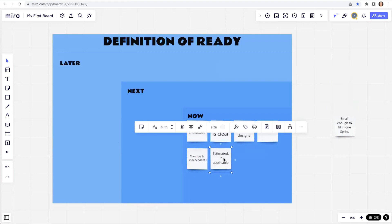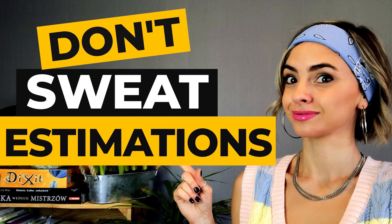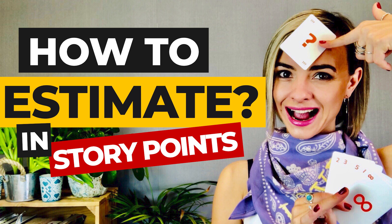Next is estimated, if applicable. I like to think about estimation as a pinnacle of refinement — we can't estimate what we don't understand. Once we get an understanding of what needs to be done, not necessarily how it will be done, the story can be estimated and we will find out if we all understood the same thing. For me, estimation is not only about predicting the future — it's also about making sure everybody understood the same. If two people in the same team give a 3 and a 13, we have a problem with understanding and need to spend some time clarifying.